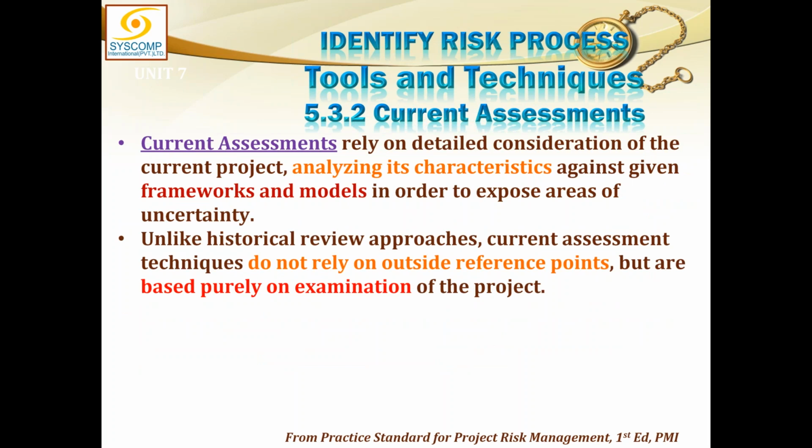Then coming over to the present, current assessment relies on detailed consideration of the current project, analyzing its characteristics against given frameworks and models in order to expose areas of uncertainty. So I am living in the present, analyzing all the possible data and ultimately coming up with uncertainties. Unlike historical review approaches, current assessment techniques do not rely on outside reference points, but are based purely on examination of the current project.